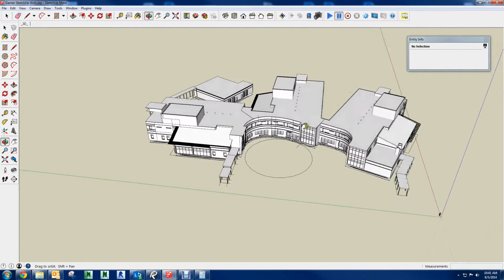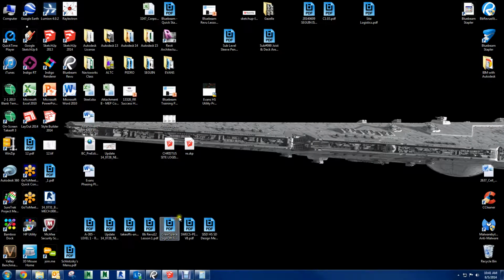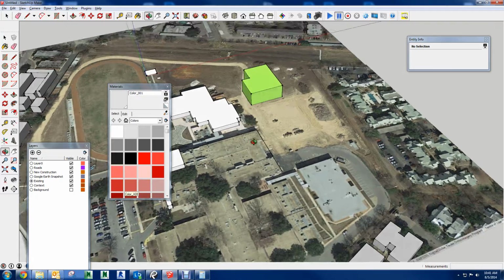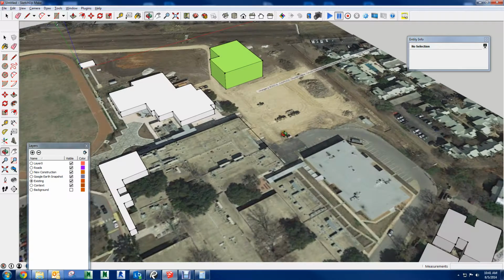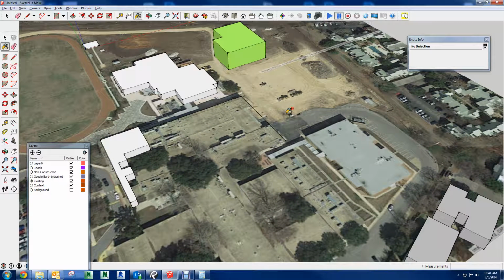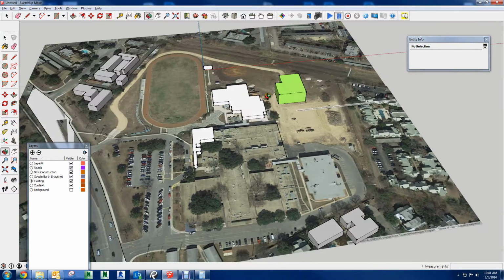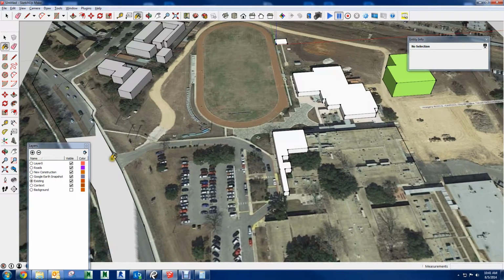And assume we already have this generic model in the SketchUp file. What else do we need to do for the logistics? Now that's where the superintendent comes in. All the construction team comes into play. You need to get with the superintendent. He's the guy who is going to say how he's going to run business there in the field. He's going to suggest, well, we should put a... And you get with him, you show him this, and he says, okay, this is going to be our construction entrance.